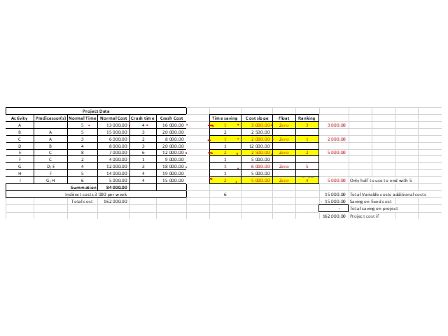So you work out your cost slope for all of these items, and you rank them. Although you only have to do it for your critical path items, because it's not necessary to do the others. I just included it here to give you an idea.